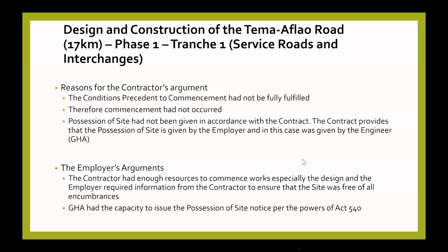So, the contractor felt that the site had not been cleared of all encumbrances, so they could not start work. We were of the opinion that there were enough sections of the project road for work to start, and that, being a design build, the design could start as well, so that by the time we were done with the design period, the contractor would have access to the site to start work.